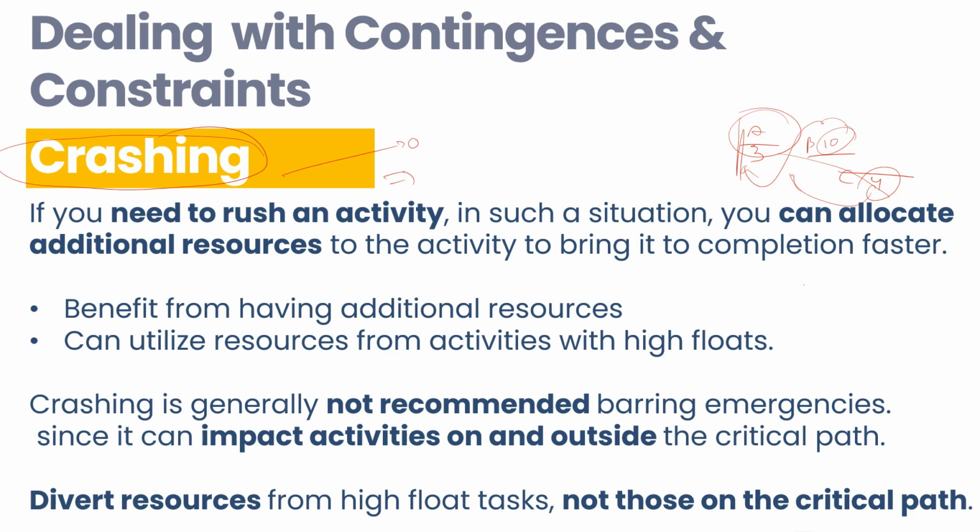Now, this is not recommended. Why? Because it disturbs the balance of your resource distribution, and it impacts both. Some activities are critical, some are non-critical. It can impact both your critical and non-critical activities, and that will lead to either delaying your project or increasing the budget. So it's not recommended, but yes, in some emergency cases, it's required.